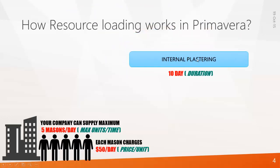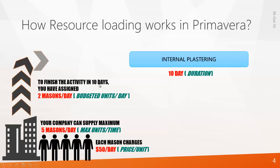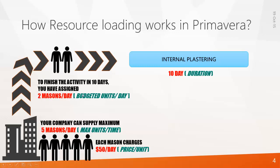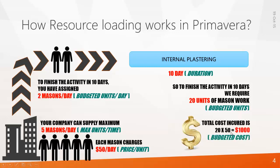Let's say there is an activity called internal plastering that is to be completed within 10 days. This 10 is called duration in Primavera. To finish the activity in 10 days, you assign 2 masons per day — that's the productivity — which is called budgeted units per day in Primavera. So 2 masons working per day for 10 days makes 20 units of mason work, called budgeted units. The total cost becomes 20 times $50, which is $1,000 — that is the budgeted cost in Primavera. This is how Primavera works with resources.